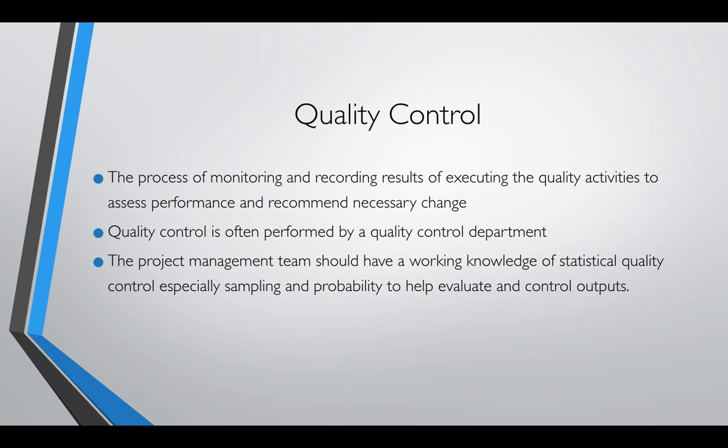Quality control is often performed by a quality control department. Usually the contractor is the one performing quality control. Not always the case, because depending on your procurement process, your contract, your delivery system, it's sometimes an independent engineering firm that performs quality control.